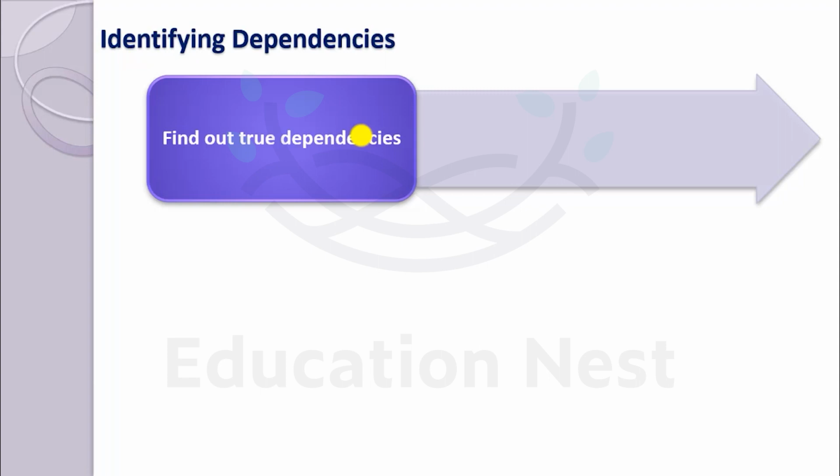So we were definitely dependent on them for fixing certain patches. The interfaces and the customization were done by my team, but if anything had to be changed in the core logic, we were dependent on the core team. But the core team was loaded with other clients' work, so it could happen that they get back to you in 4 days, 5 days, so it happens. So when you find out the true dependency in such kind of project, it's very important that you have contacts so that you can get things done very quickly. So all these things happen.